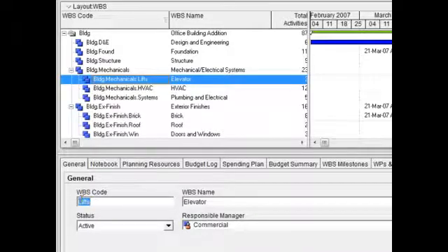So when we create it, we need to assign a code, we need to give a name, and we need to select the responsible manager. If we don't assign one, the default is whichever the OBS is assigned to the project level. That's again going back to our EPS node. So that's what I have for you over here, and that's what we're going to do.